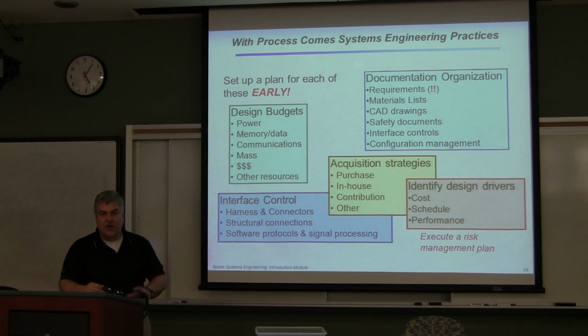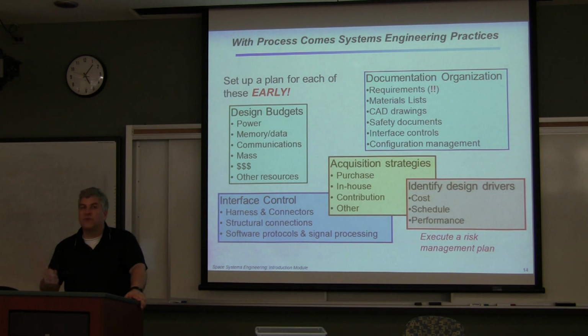Acquisition strategy is another aspect of the system. Do you buy a subsystem or do you build it? Very often it's a lot cheaper just to buy something from somebody else. They call that OEM, right? Original Equipment Manufacturer. Hardly anybody builds hard drives anymore except for maybe 3, maybe 4 companies. So you buy it from one of the companies that you know will do a good job.